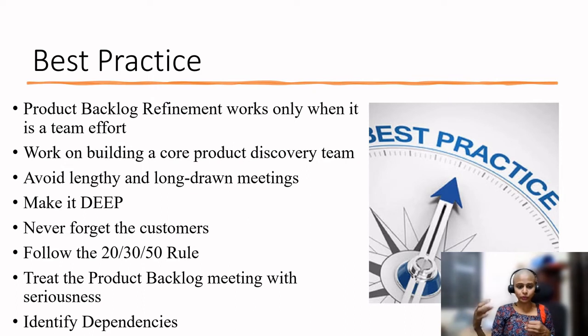But in planning, we will do that. But if you are very sure and very well aware, if we pick this item, these are all the dependencies. Please identify them. Try to identify as many dependencies as possible in the product backlog refinement itself, so that, based on the dependencies, if something may not happen immediately, we can reprioritize and work it out, or otherwise we will split how we can make this one. So that kind of challenges we can take up in product backlog refinement itself, instead of having that in the planning meeting or in the upcoming sprint, when the sprint progresses.